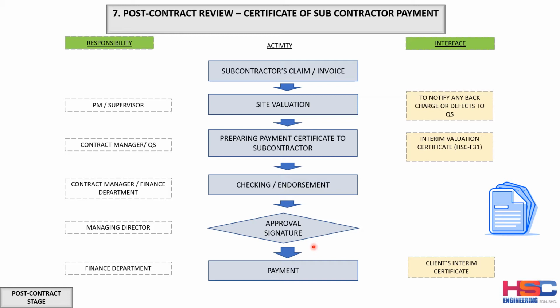And once the payment certificate is approved, it will be passed to the finance department for payment, and the payment will be based on the contract terms and conditions, on the subcontract terms and conditions.